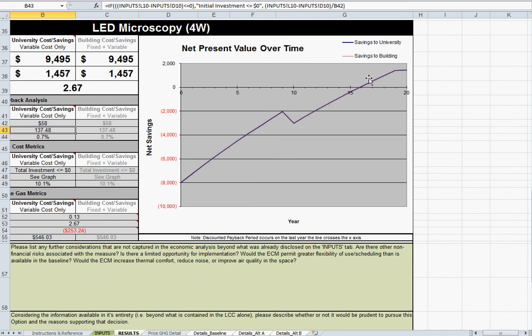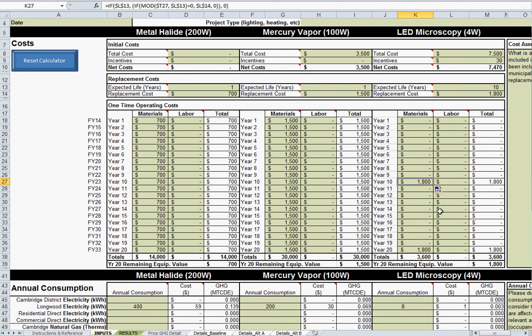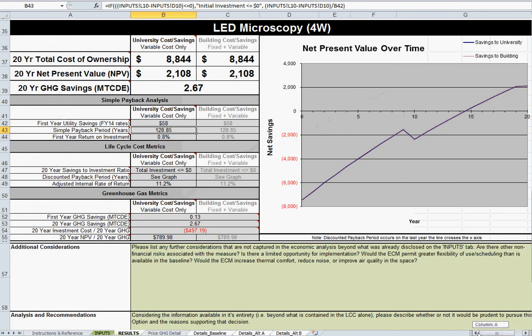And one thing I should point out with this system, it actually pays back better than this. I didn't think about it when I set it up, but I went with less conservative, or poorer, pricing than what we actually saw. These are probably closer to $1,800 if I remember correctly, and this was somewhere in the neighborhood of $7,500. So 10 years, 1,800. Let's look at it. It's slightly better at about a 14-year payback. So with that in mind, we get a little better there.